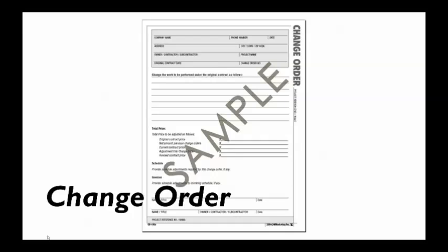And so we need this additional money in order to make that happen. Or it could even be that when they did the original cost estimate, maybe a certain material cost a certain amount, and then that material cost has inflated between the time that the last cost estimate was done and the time it actually gets built. That happens too. Or maybe a manufacturer went out of business and then the comparable product to the one that was specified is twice as expensive. So, all different kinds of things happen.